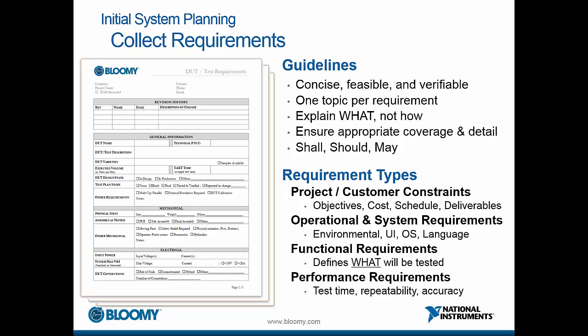In general, requirements should define what, not how, and implementation and solution details should be omitted. Requirements should not restrict an engineer by forcing them into a particular solution. When developing a requirement specification, the key is to ensure appropriate coverage. A limited requirement spec may result in a system that meets all requirements but does not function as expected, and an overly constrained system may be more costly or take longer to implement. All project roles such as project manager, engineers, and manufacturing should have input into the requirement specification.